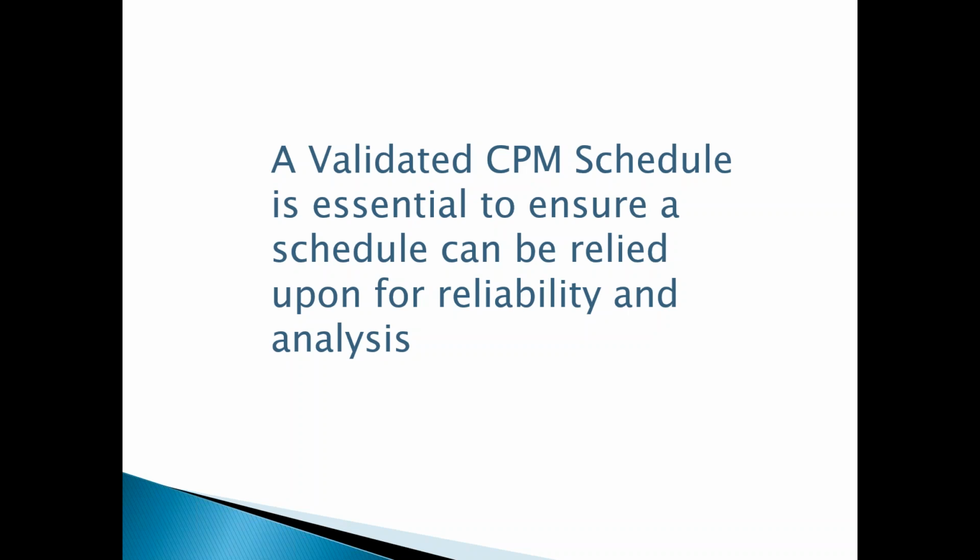So it ends up becoming a great quality control program if you get your schedulers, or if you're reviewing schedules from a contractor, to turn in a diagnostics report with their schedule, and that just helps ensure that they've taken a look at it, and it'll just help the process. It's a great quality control, good training technique to run these diagnostics tools.